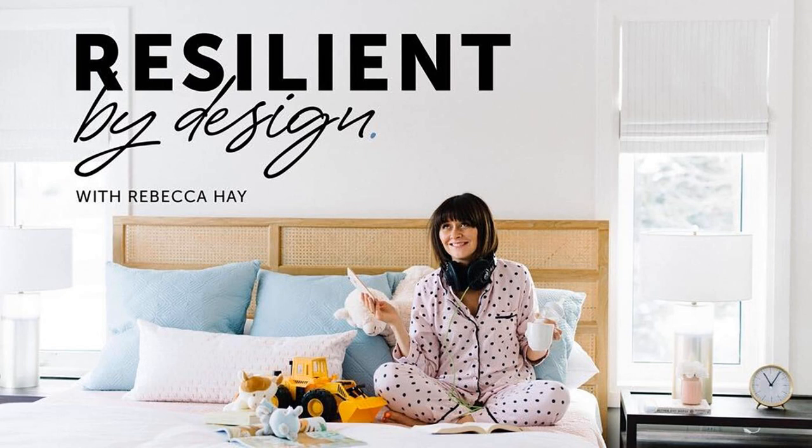It's a lot of work, and you have to put in a lot of hours up front to make sure you're making every tiny selection. You're picking the trim molding, you're picking the baseboard, the profile, the height, you're pricing everything out. You're picking the light fixtures. What type of light bulb do you want, right? For the light color temperature, you're selecting all of that up front before you've taken a sledgehammer. And so what's really helpful is that then you can focus on implementation, but you've got the full design package.